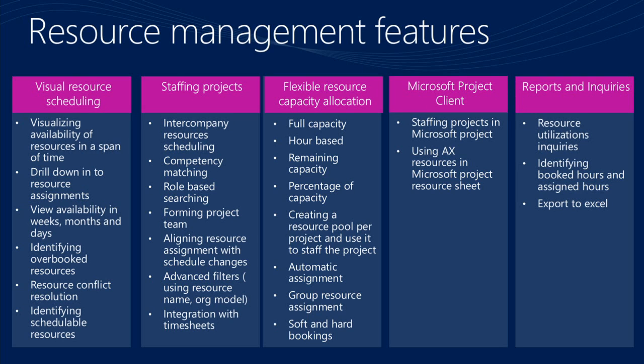Again, we introduced the flexible resource capacity allocation. So we have introduced a couple of models. One is full capacity. According to a resource calendar, when you book their full capacity on a project, again, according to their calendar, they are booked. If my day is Monday to Friday, 8 hours a day, I'm fully booked there.